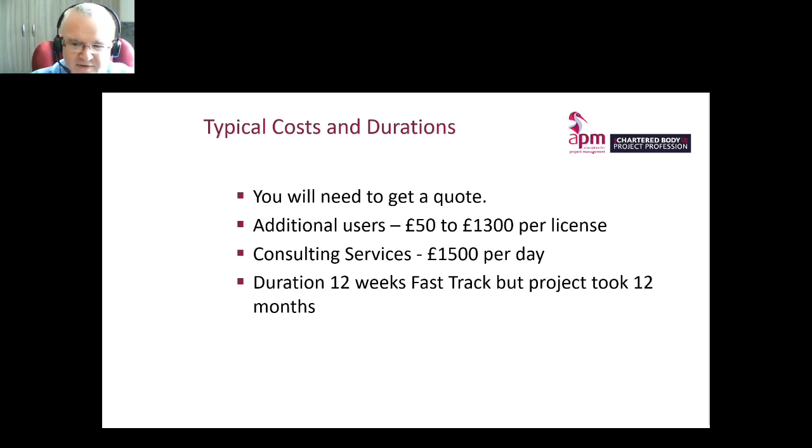So once they got the confidence in the system in phase 1, which was to implement the demand, you know, putting new things in the system, the execution and the tracking and the closeout of projects was in phase 1. Phase 2 and 3 was looking at program and portfolio management and some of the more complex reporting. We actually combined those 2 phases as people got used to using the system. And the training became easier as well, because they understood the architecture of the system and the tiles, and they were used to the look and feel of it.